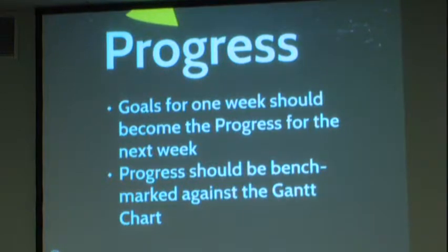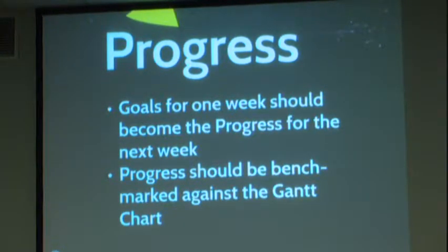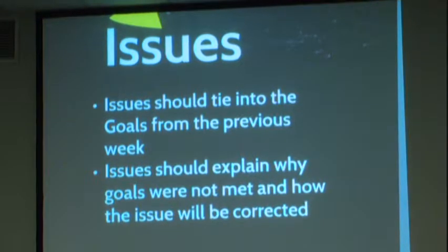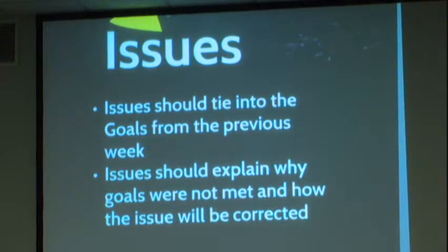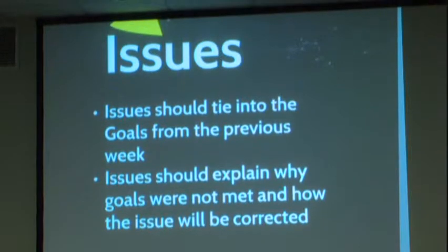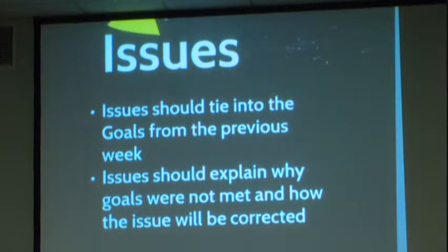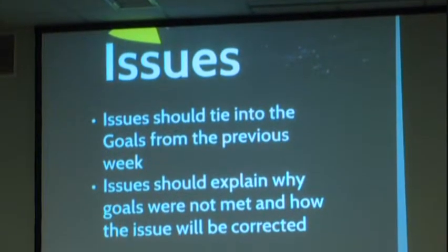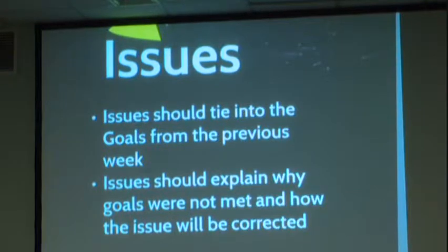But when it slips, you're going to have issues, okay? The issues are the difference between your goals and your progress. So I had my goals, I subtracted out my progress, and it left me with my issues. Why didn't you achieve your goal? As a project manager, you do your PIGS, you ask your design leads for their PIGS for each week, right? Your design leads should be feeding this into you if you're the project manager.